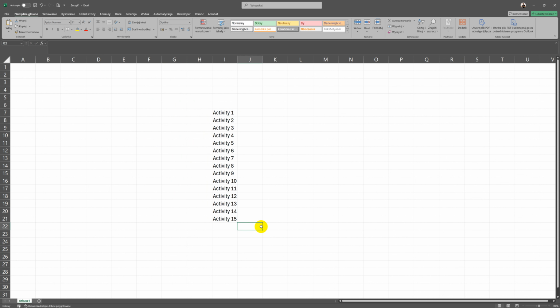On this axis you can set the units, the time units. It can be a day, it can be an hour. It's also up to you how you will choose the activity unit, and how precise you will be with the time units, because if you don't need to be very precise, you don't need to divide every day into working hours, but you can assume that every employee works 8 hours per day, so you can divide one day in 8 columns. It's up to you what would be the precision of your timeline.